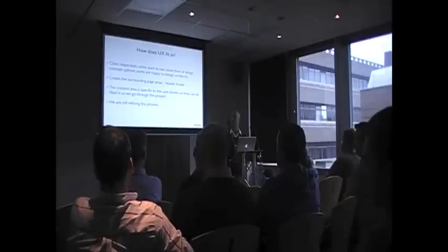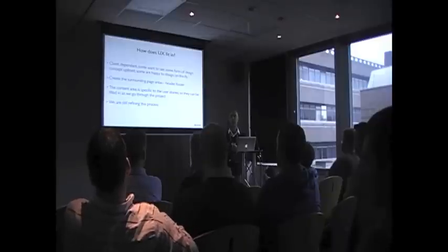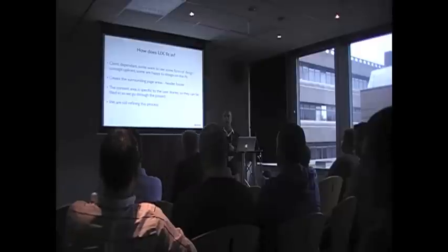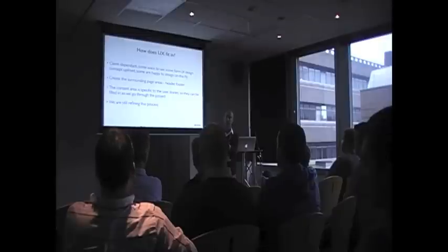So during the sprint, it's time to test. At the end of every week, we do a demo to the client of everything that we've done in the previous week. But also, if there's a question that we have, just phone the client up. Can we just show you something? Is the editor working the way you want it to work? Can you add a blog article easily? Is this what you expected? So you don't get to the end of the sprint or the project and find out that you've done it wrong. They're involved in it.